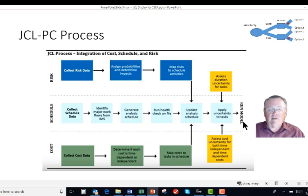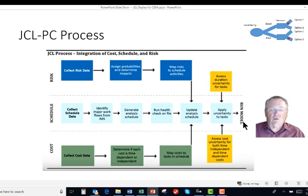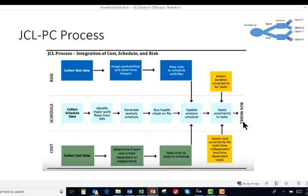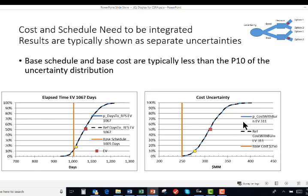From that, you're going to get an uncertainty of both cost and schedule integrated into one analysis. The typical output is to show them separately. In other words, there's the distribution for the schedule shown here, elapsed time, and then a distribution for the cost uncertainty.